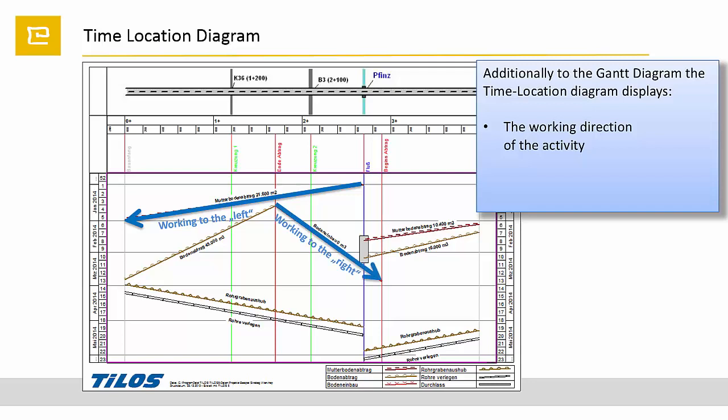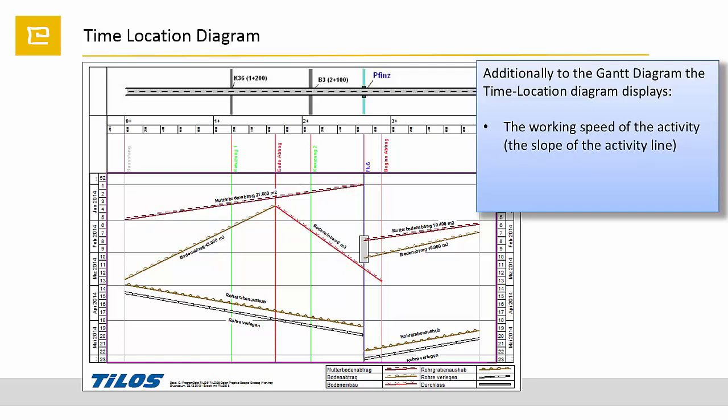And it displays the different working speeds on the activities by a different slope of the line.